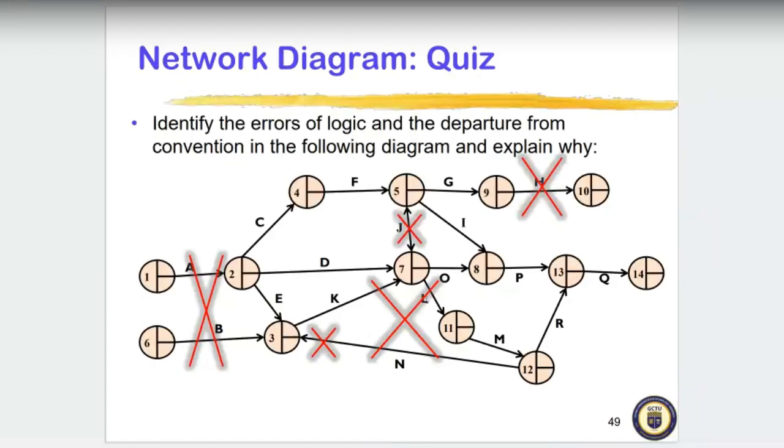So this is also moving in the form of a loop. This one is going in reverse order, rather. We said we are drawing it, we are moving forward, not backwards. But this is moving backwards. We find this to be a violation. Let's look at it from this side.